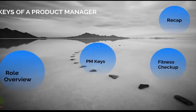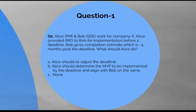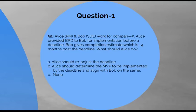Now let us go over some fitness checkup questions. Alice, who is a product manager, and Bob, who is an SDE, work for company X. Alice has provided a BRD to Bob for implementation before a business deadline. Bob gives a completion estimate which is approximately 4 months post the deadline. What should Alice do in such a situation? Choose from the following options: A. Alice should readjust the deadline. B. Alice should determine the MVP to be implemented before the deadline and align with Bob on the same. C. None of the above. The correct answer is B. In the tech industry, it is very common that the implementation timeline may vary from the business deadline. In such cases, the PM should outline the MVP needed to launch.